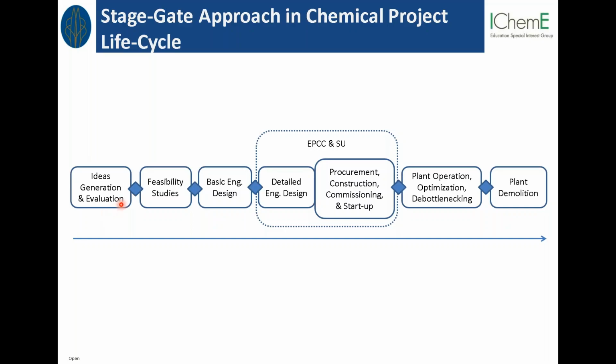If we do a brainstorming, there are many techniques of doing this brainstorming. And then out of this 100, we're not going to apply them all, but we have to be able to select them. Maybe in this evaluation step, we will do some evaluations, and then select out of this 100, for example, maybe 10, 20 selected ideas. We will do some more selections, evaluations, more in-depth study, and some feasibility study, which in the end, at this gate, we might end up with maybe one or two routes or technology or process.